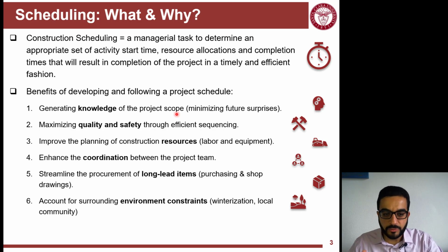Another thing is if you do a project in Midtown in a large city where you have a carnival on a certain day, you can account for this in the schedule and put this date in the schedule as a constraint.